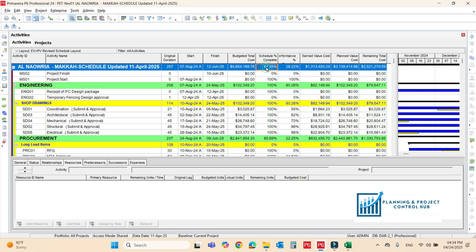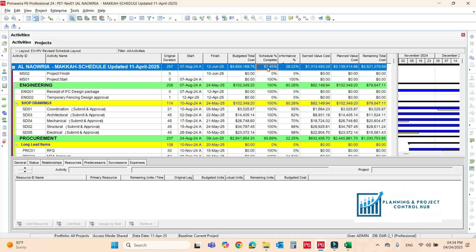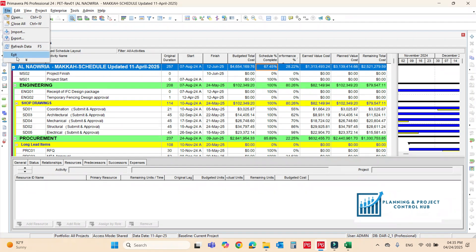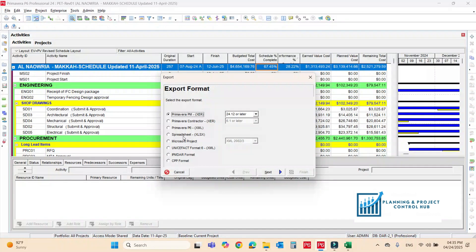For the revised one, if there is the scoping, if there is a variation order, if there is an extension of time awarded, a consultant asks you to revise the baseline and you have to make the revised baseline for that. I already opened the layout here. Now we will export the excel file.